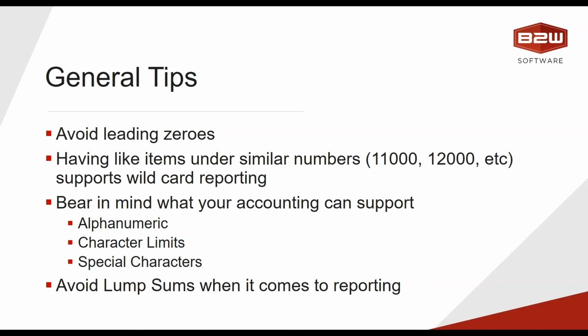Lump sums, and I see this especially with mobilization, instead of treating it by the load or by the each or by any other kind of number, it's difficult for the field to report on, and it doesn't give you a lot of great information when you're looking at the codes. So something to bear in mind, especially when you're pulling it into whether it be B2W Track or any other kind of field tracking application, try and assign something that's relatively universally understandable and apply square footage or cubic yards or cubic meters, whatever you're working with, to that system to make it a little easier.